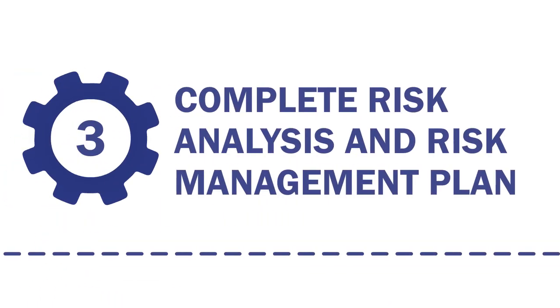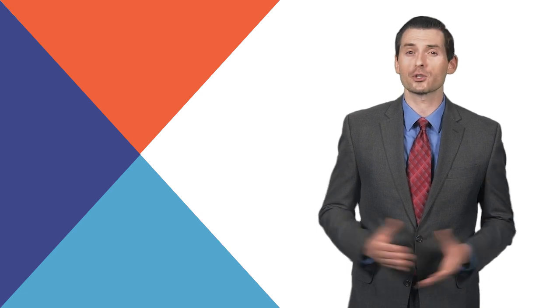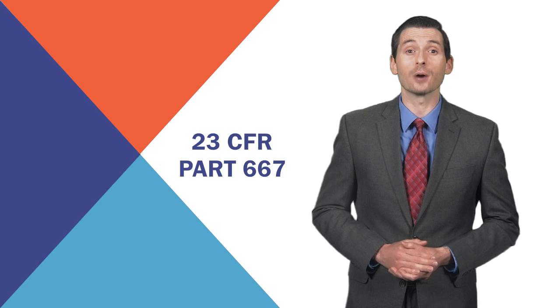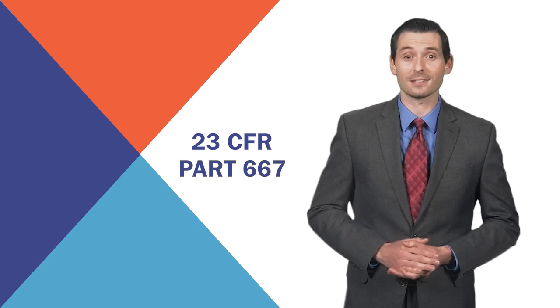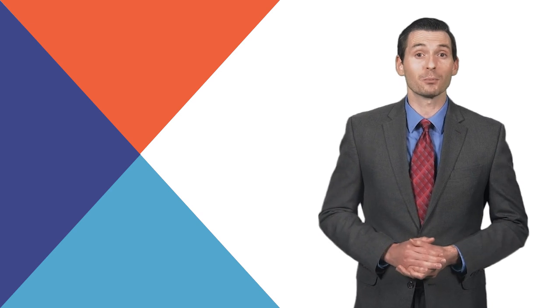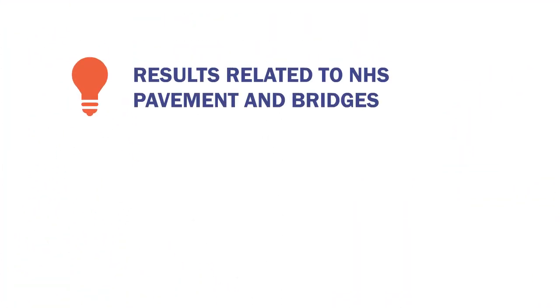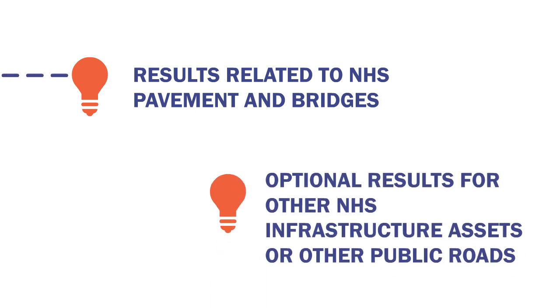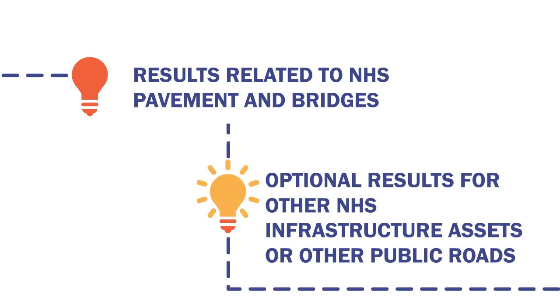3. Complete a risk analysis and develop a risk management plan for NHS condition and performance. These risks include those associated with current and future environmental conditions, such as extreme weather events, climate change, seismic activity, and risks related to recurring damage from emergency events, as identified by the evaluation carried out under 23 CFR Part 667. The process must produce a summary that discusses, at a minimum, the results related to the state's NHS existing pavements and bridges. If the state elects, it can include optional results for other NHS infrastructure assets or other public roads assets in the transportation asset management.